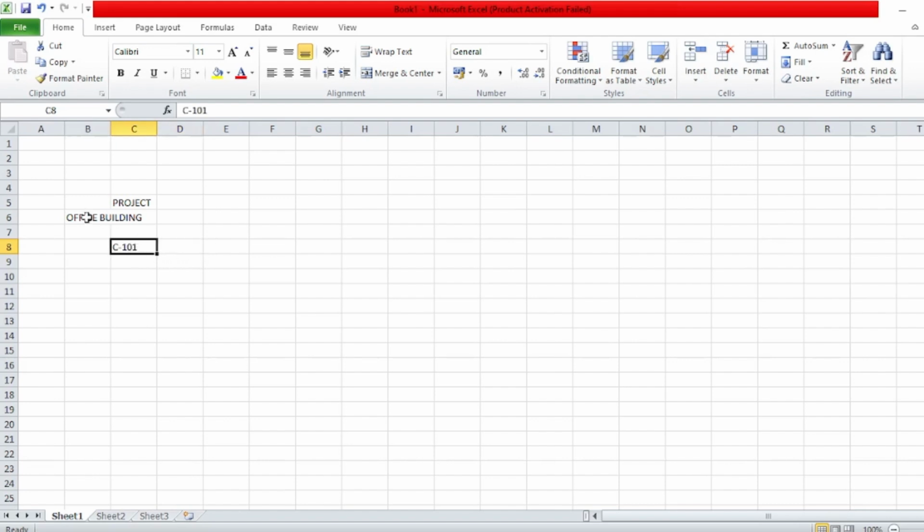Till the time the project goes to completion, whatever expenses we are booking use a WBS element number. Let's say we are creating n number of POs to buy raw materials, goods, finished materials, or anything, for example to buy furniture, or to rent, or to raise a purchase order to a contractor to give a contract to build the building.